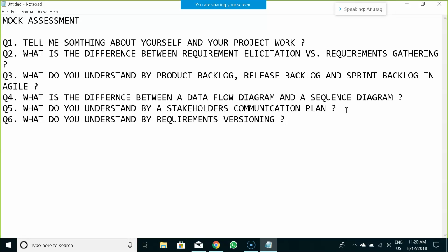So how you would version it is you would create a new requirement and link the old requirement with the new requirement. So you would establish traceability. If someone would like to trace the requirement from source, how the requirement originated, they can go through the different versions of the requirement, which the requirement has gone through so far.